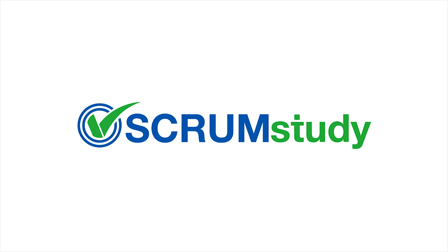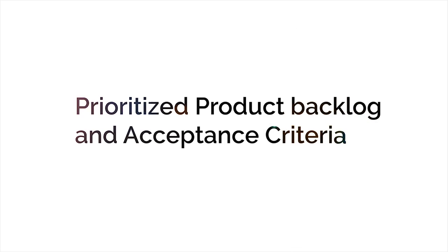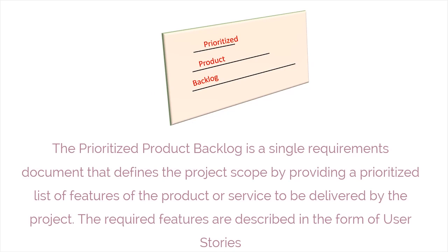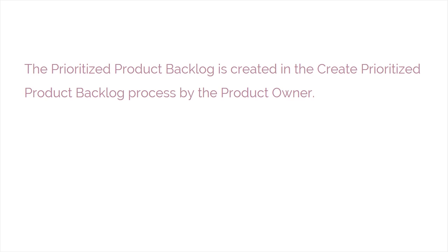Now that we understand the differences between quality and scope and how they are related with business value, let us discuss what prioritized product backlog and acceptance criteria are. The prioritized product backlog is a single requirements document that defines the project scope and quality by providing a prioritized list of features of the product or service to be delivered by the project. It is created in the Create Prioritized Product Backlog process by the product owner.